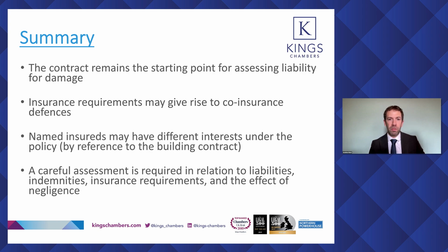I think in terms of practical tips or takeaways from this topic, number one would be in a claim which involves damage on a project, always check the insurance requirements, even if there isn't actually a relevant policy, because even if no policy was ultimately taken out or no claim was pursued, it might well provide a defence or circumscribe the extent of the party's liabilities.